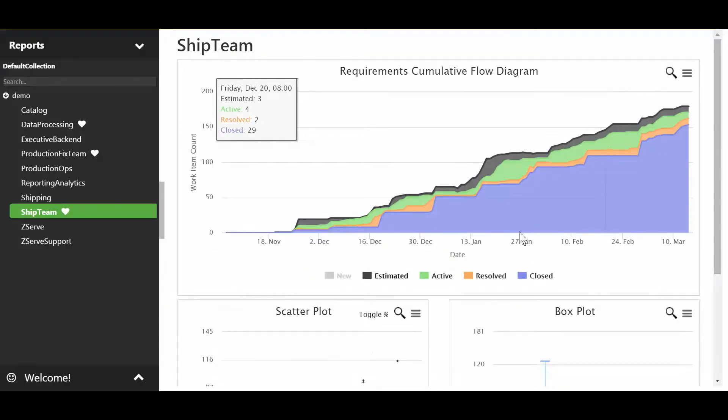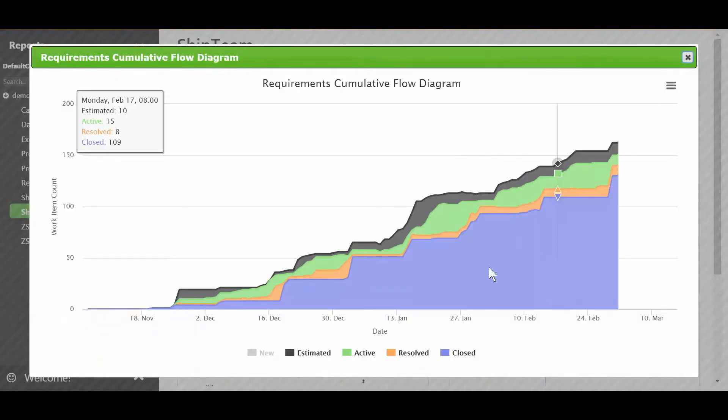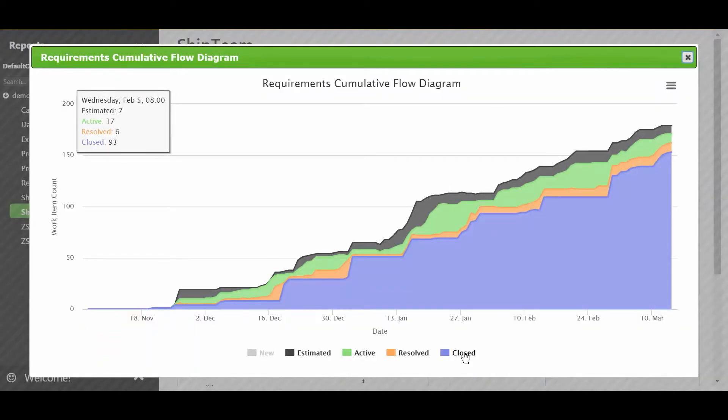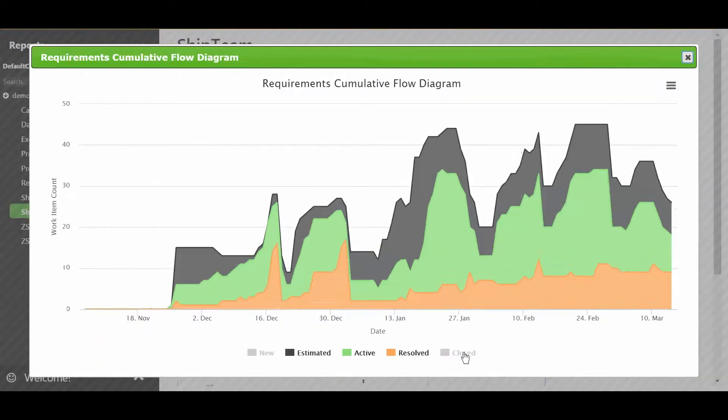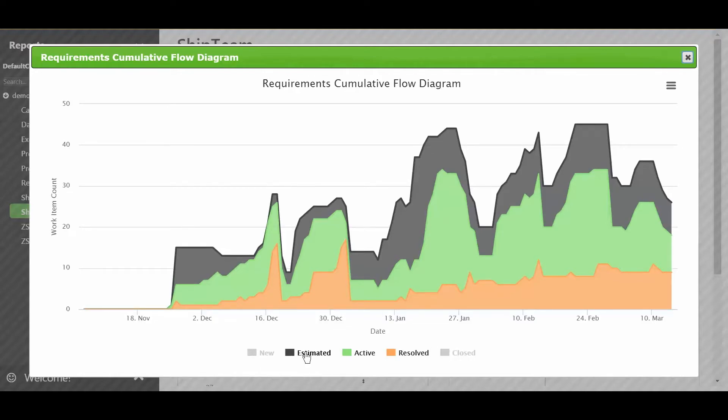If I zoom into the cumulative flow, I can do something by getting rid of the closed state and it gives us a finger chart. A finger chart really should, if it's a nice clean flow, flow like looking at your three fingers, just solid bars. As you can see, this is not the case.